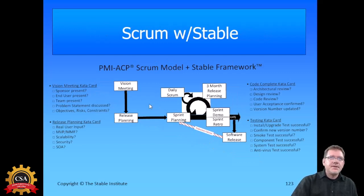So if you're doing STABLE with Scrum, you would have a vision meeting Kata card: sponsor present, end user present, team present, problem statement discussed, objectives, risks, and constraints agreed on, success criteria agreed on. Release planning Kata card: do we have real user input, or are we just sitting in a room talking to ourselves? Have we organized the requirements by MVP and MMF, minimum viable product for version 1, and then everything else after that would be a minimum marketable feature set, version 2, 3, or 4?